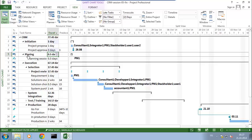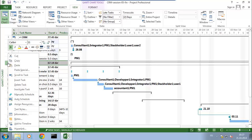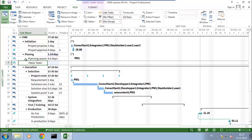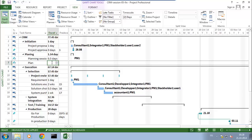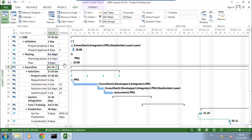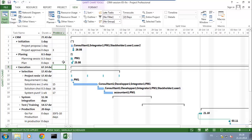I will add another milestone below in the planning, because milestones can also be used for deliverables. I will insert a task which is the plan itself — meaning I have a deliverable here which is the project plan. I entitle this simply 'plan' and once again set the duration to zero days. I set its predecessor to task number six, which is the planning session.